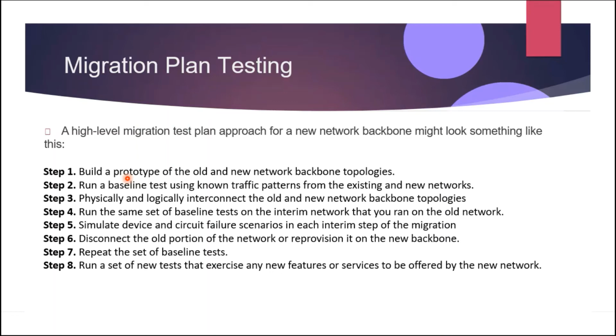So a good migration plan should address how routing protocols and applications will interact with a network that is partially migrated, providing success indicators and a backout plan when unexpected behavior is encountered during the migration. So testing of a migration plan is an essential part of the design process for networking projects of any scale. It is sometimes a requirement for the implementation or operation groups responsible for making changes to the network.